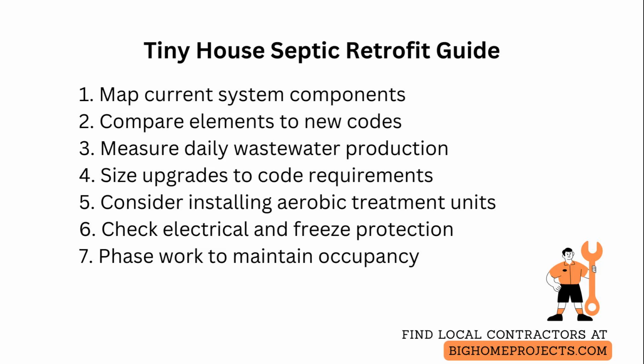Finally, sequence work to allow the tiny house to remain habitable when possible by phasing installation tasks and arranging temporary holding solutions if pumping or disconnects are needed.